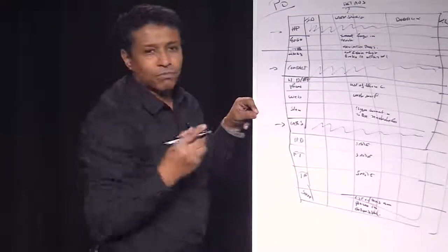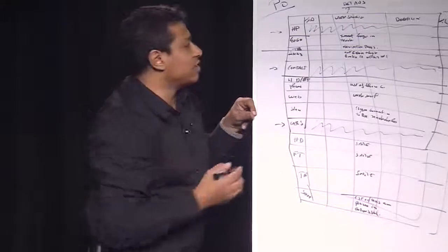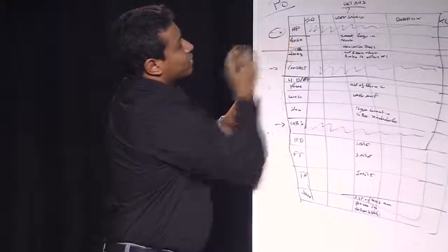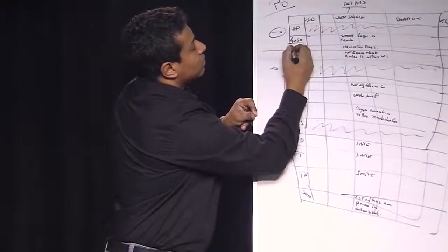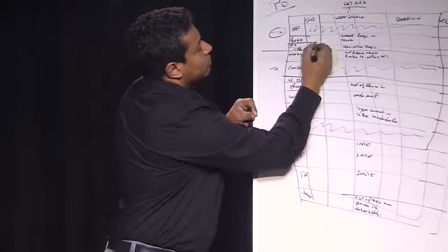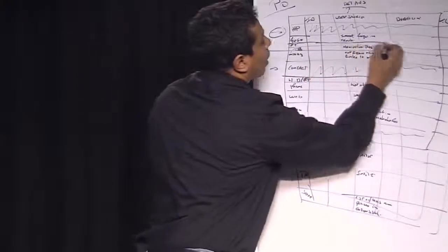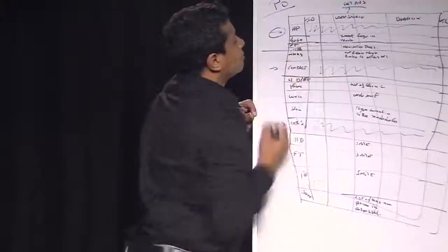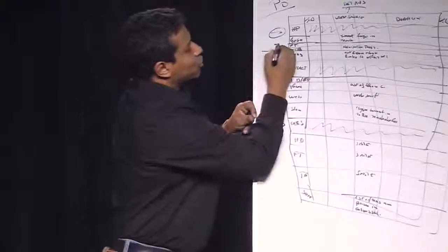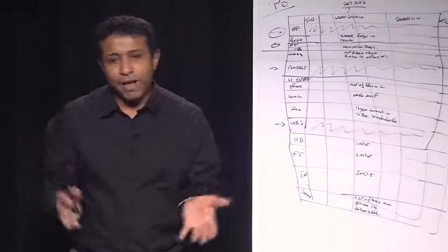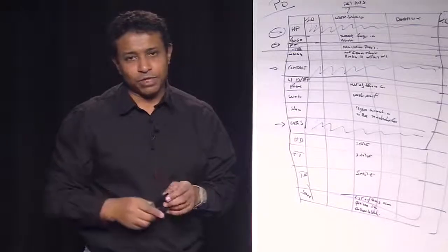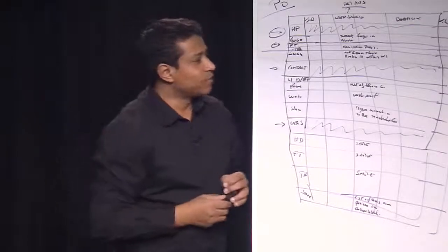I may be intelligent to first develop the header and the footer, so that I'm sure that I will get, let's say, the bare bone of all the pages. This is one view.